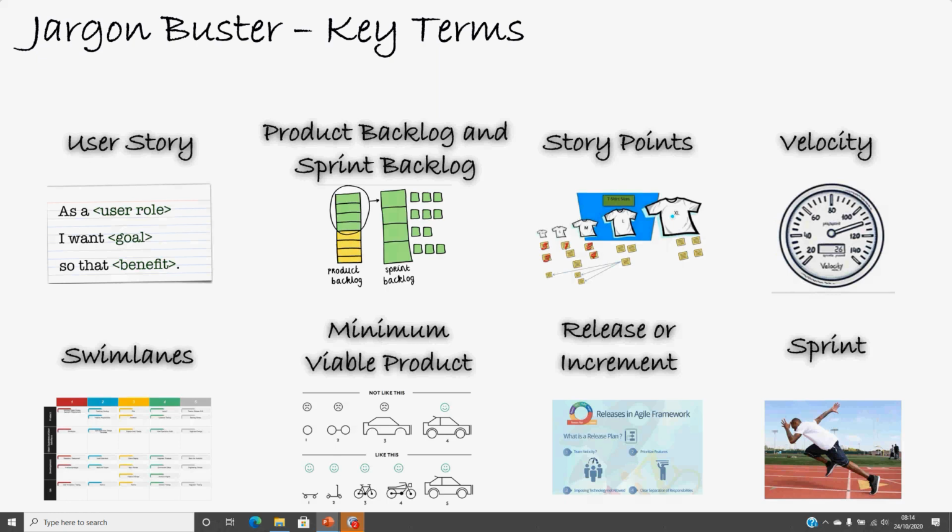They will finish the sprint 1, and then when they move to sprint 2, they will again go to the product backlog and see, okay, so what's in there? Okay, now we will pick user story 4 maybe this time, and we will base our sprint 2 on user story 4. So now they will produce another one, the enhancement of the product based upon the new user story, and then so on and so forth. So that's how your product backlog and sprint backlogs work.